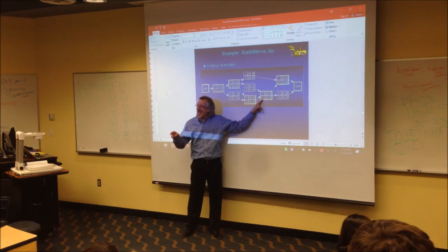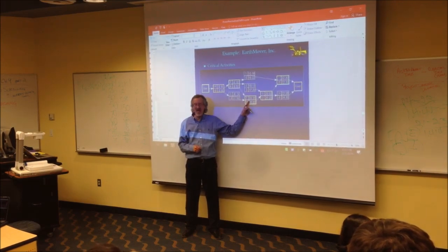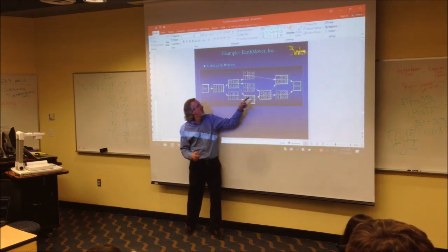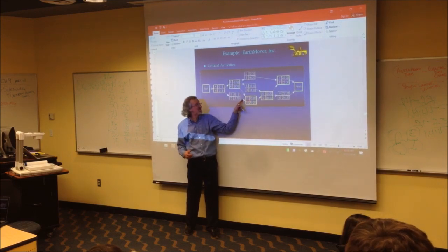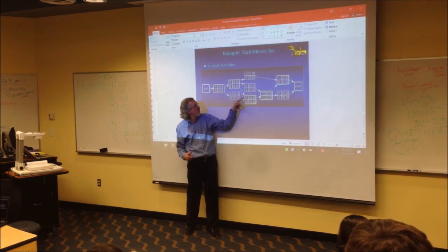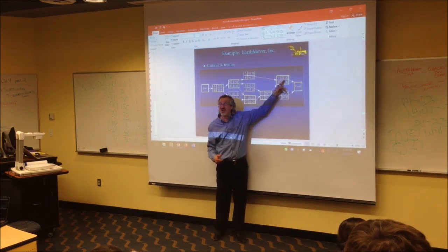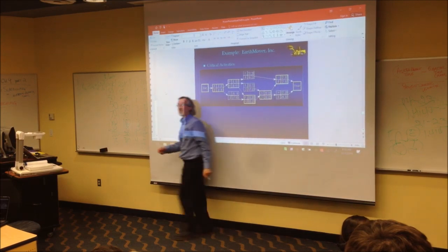Now you have to do it again, using this as the x sub F now. So there'll be two x constraints for that activity. One that has B, one that has C. There'll be two x constraints for this activity, one that has D, one that has G.